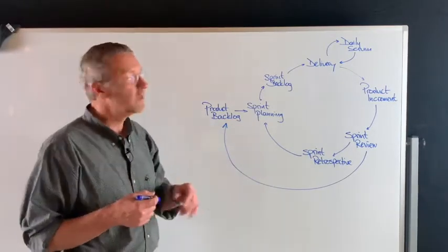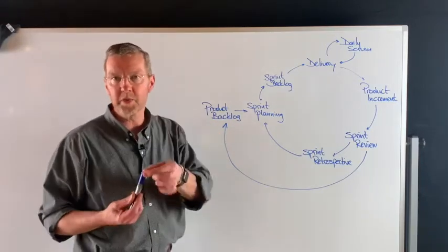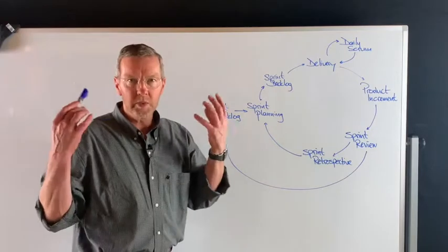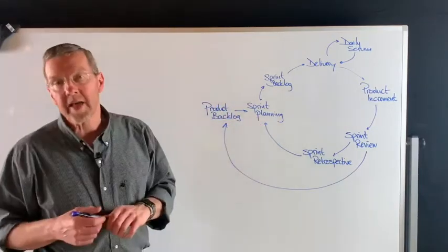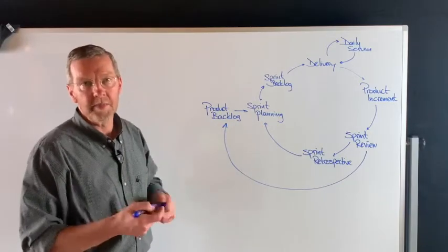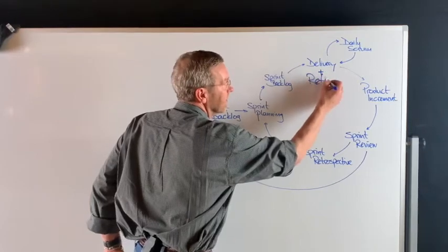They have to refine that product backlog item that says produce me a cap into enough understanding so they can do the planning. Refinement happens one sprint ahead, and it happens in parallel with the delivery.